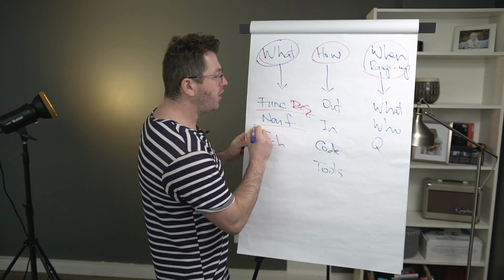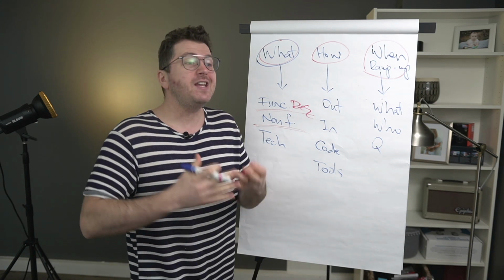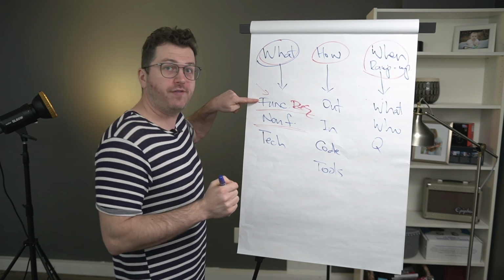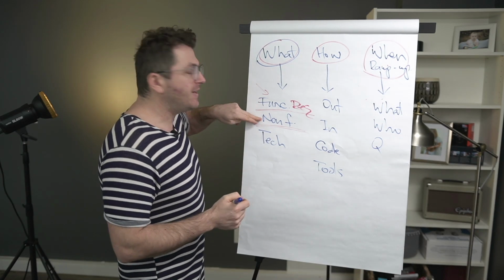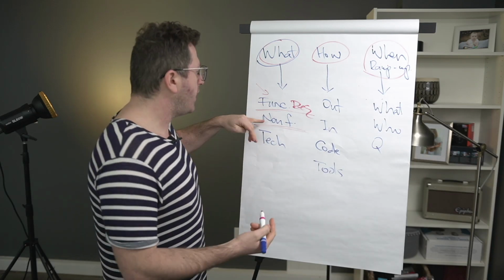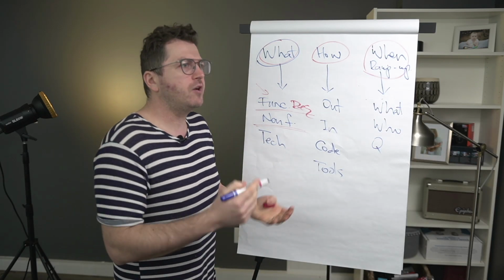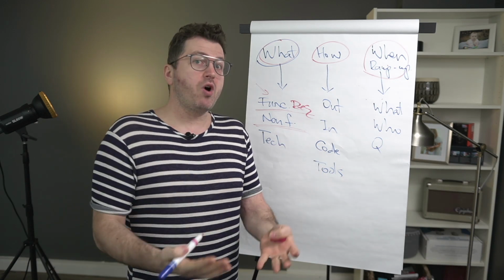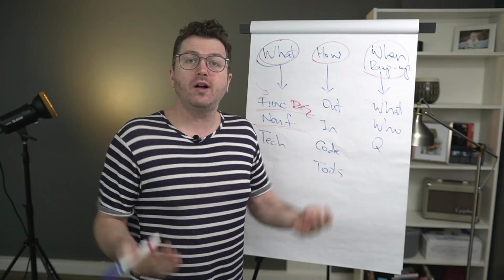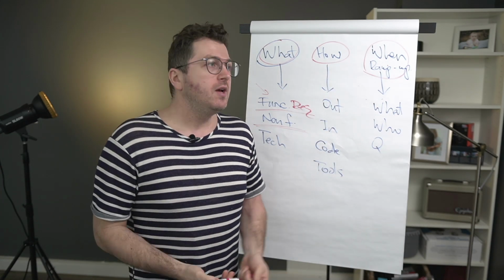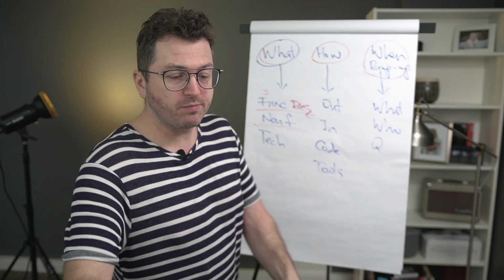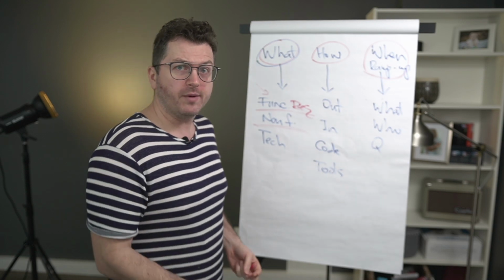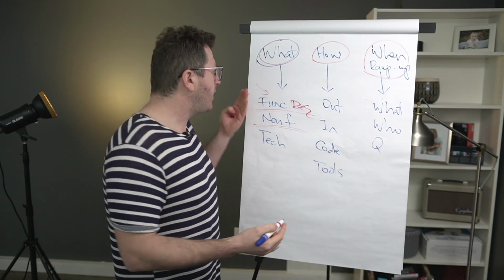The second one, non-functional requirements. What does that mean? Anything else that is being built in the product to accommodate and to support the functional requirements, but it's not a functionality in itself. For example, how many people is your product supposed to support using the product at the same time? How fast is the response time supposed to be, and things of that sort. So those are non-functional requirements, things that your product is supposed to be doing, but it's not for the user in itself.